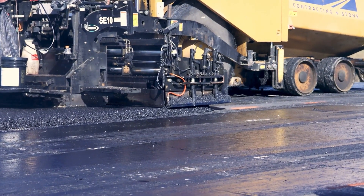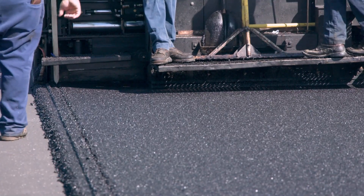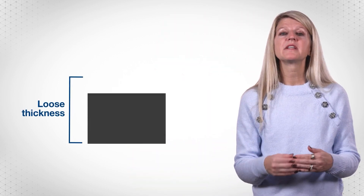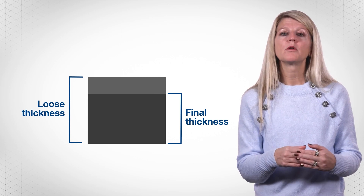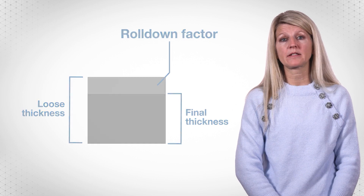Another important consideration is the roll-down factor. Understanding the roll-down factor is critical to setting the screed height to meet the final specified thickness of the project plan. A paving machine spreads the material on the ground and strikes it off evenly to provide a smooth surface and uniform mat thickness. The mat will get thinner as it is compacted, so the foreman must calculate the initial loose thickness based on the final thickness. The roll-down factor is how much thicker the loose material is than the compacted material.